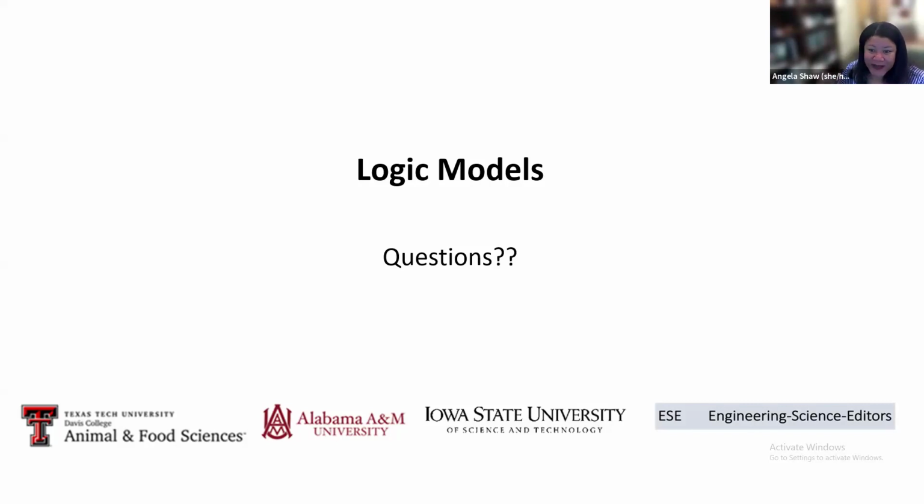So if you have an advisory board, a lot of times they want to see honorariums in there, or maybe matches of their time. They're very mindful of the use of people and making sure they're being paid. You can have a PI who is going to be doing 3 objectives, and they have no graduate students and no time on the grant. So how are they possibly going to do this work if the budget's not aligning with the outputs and the outcomes that you have put in there?